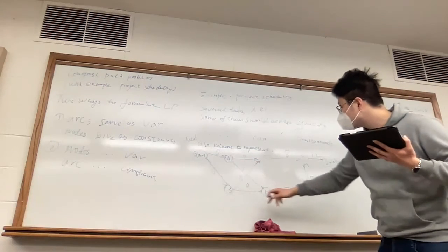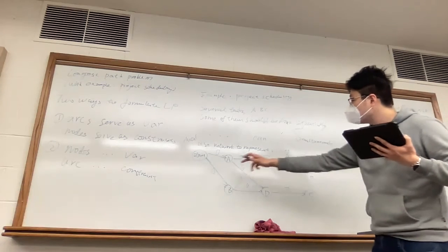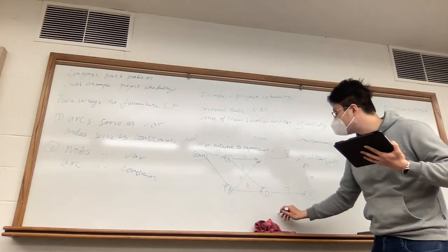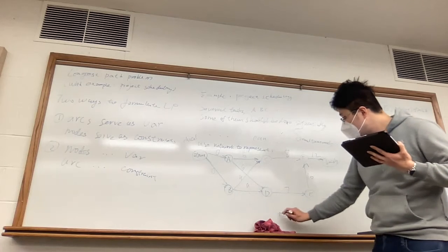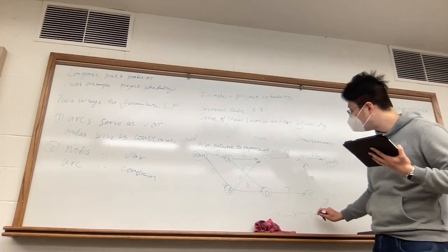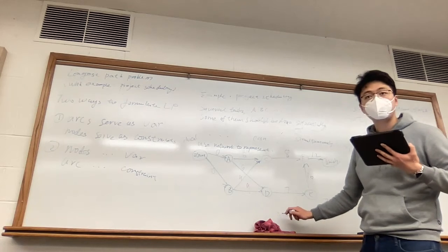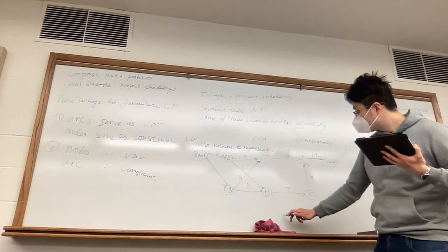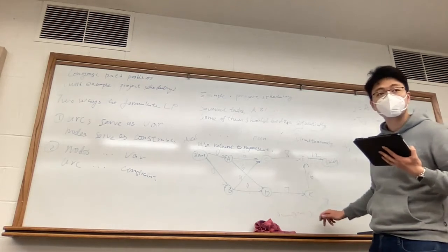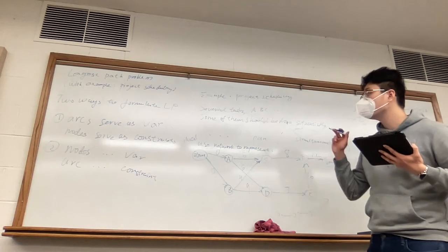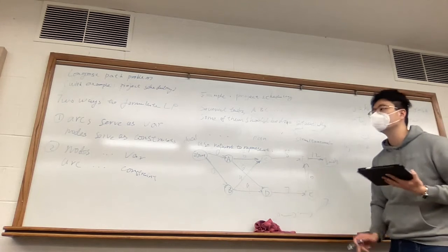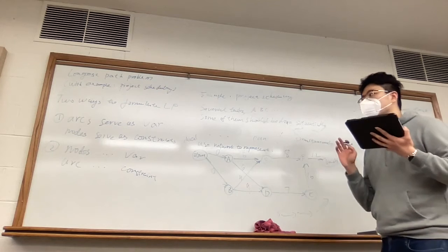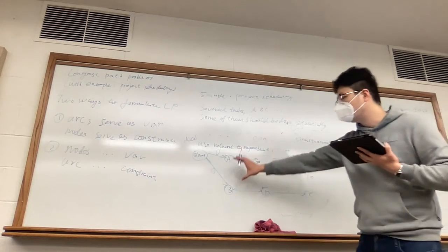You find the longest path. And along this path, because this is a directed network, you find a longest directed path. For all the intermediate nodes on this path, they are prerequisites to each other, right? So if you find the longest path from start to finish, this is equivalent to the minimum time that is required to complete all these tasks.